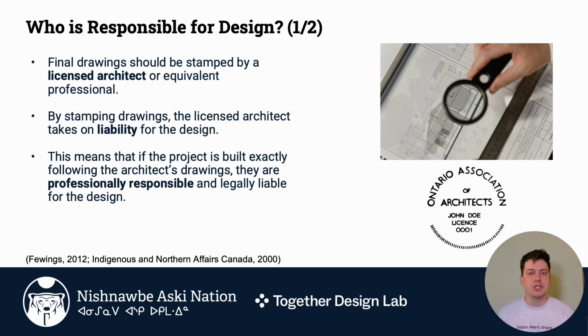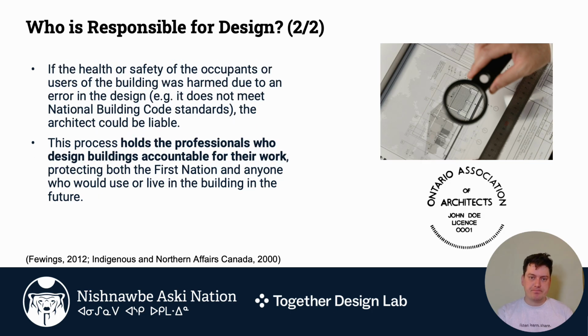And the way to do this is by ensuring that your drawings are stamped. And we show an example of a stamp on the corner of the slide here. The stamp and what that means is that a professional is signing off and assuming liability for what's contained within those drawings. Though, an important note here is that you do have to make sure that what's built is built to the exact specification of the stamped drawings, or you aren't actually reducing that risk and liability.